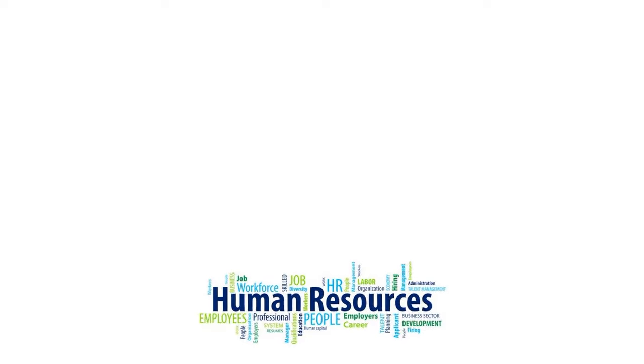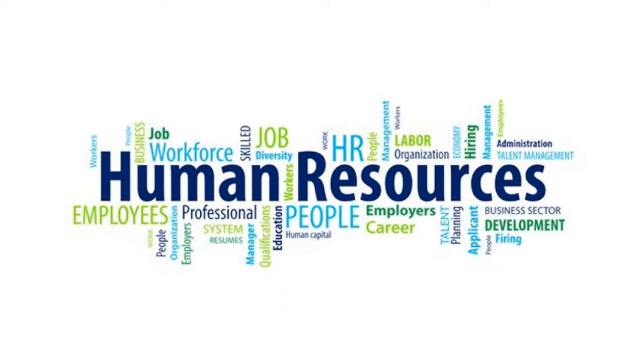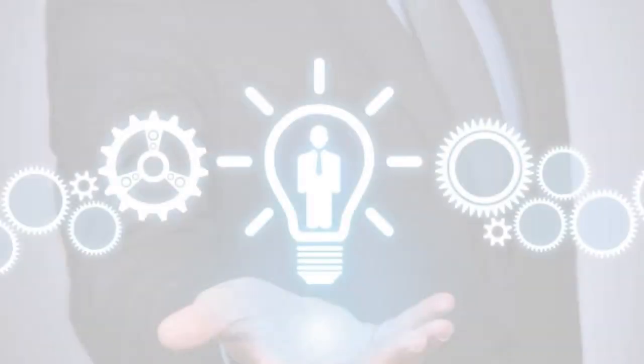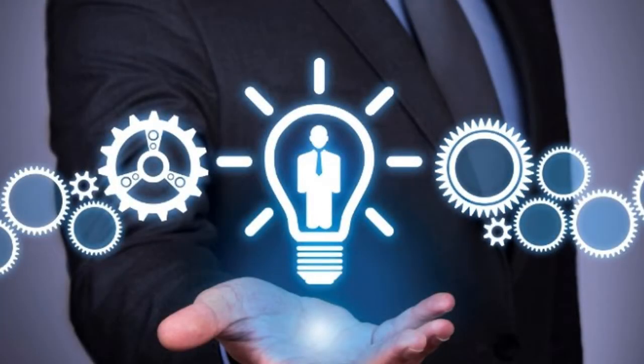Evaluation of human resources. In most projects, the personnel costs are the largest costs of the whole project. The evaluation of suitable employee profile for the project execution is the basis for a precise evaluation of the complete costs. The availability of personnel with specific skills and their number has a key effect on the determination of a schedule for certain tasks. When the human resources evaluation is set, we need to review the initial steps of project plan development to preserve the evaluation precision.